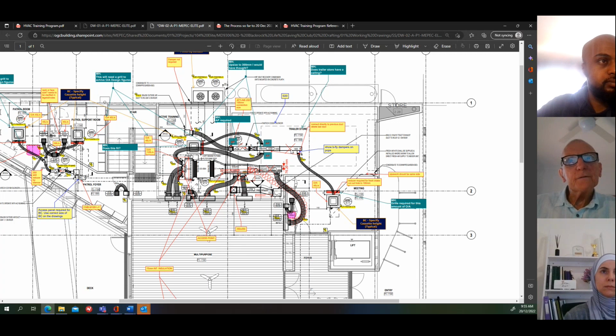And to give you a rough idea, obviously it depends on the size, but a small piece of duct like that, 250 by 250, 1400 long, probably costs about $300. I'm probably going back 5 years when I last looked at how much it cost to make a piece of duct. So now it might be $600 by now because things have gone up so much.